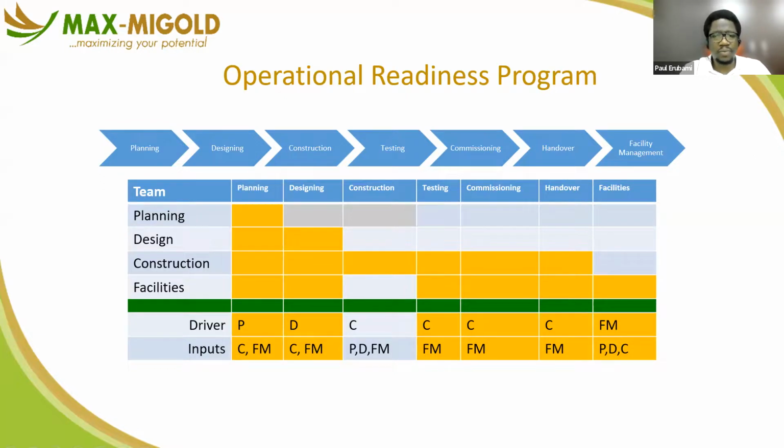Your job in the testing phase, you're not the expert in testing. You're just going to ask the engineers and designers to provide for you the testing templates. There are templates that show the normal parameters for everything they are going to build. If they're going to build a concrete slab, there's a normal parameter for the concrete slab in terms of how much resistance, the structural strength, the density, the weight. You know, they have all of those measures, right? They've written them down in a template.